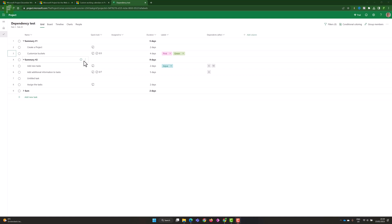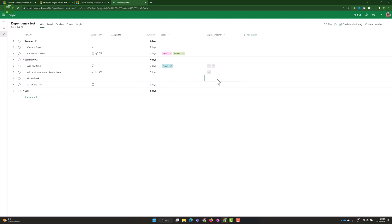Here we are on my machine looking at a simple schedule template from Project for the Web. This is my own tenant, the Project Corner tenant, and what I'm seeing here is that the dependencies — dependent after, dependent on — don't yet have that new functionality. If I want to change the dependency, I might want to make this dependent on, for instance, number nine. There's no way to add a start to start, start to finish, or finish to finish kind of dependency — the ones that have been requested for so long.